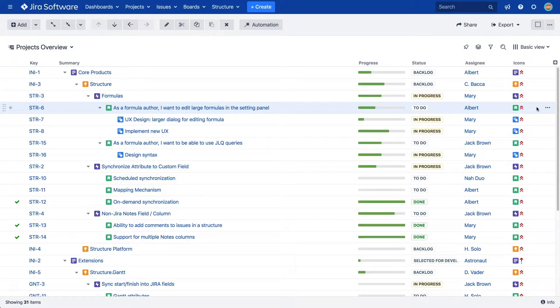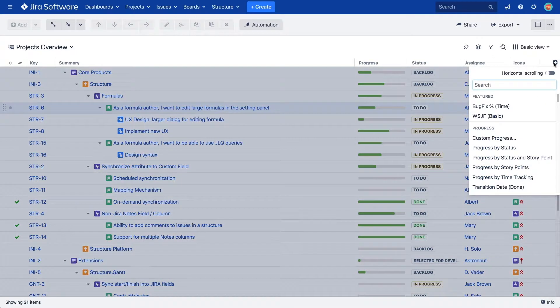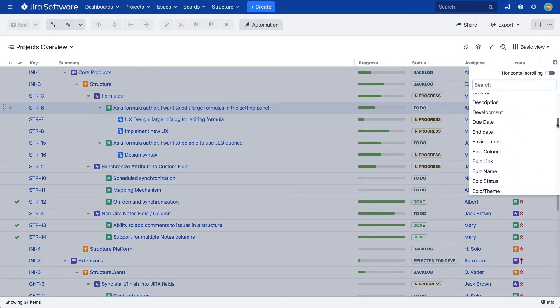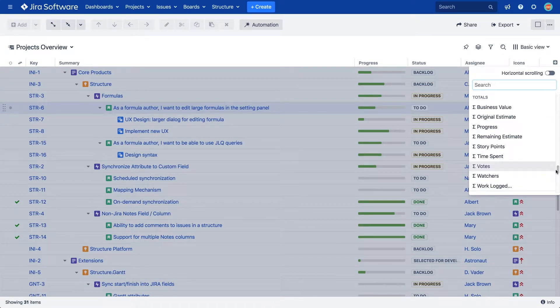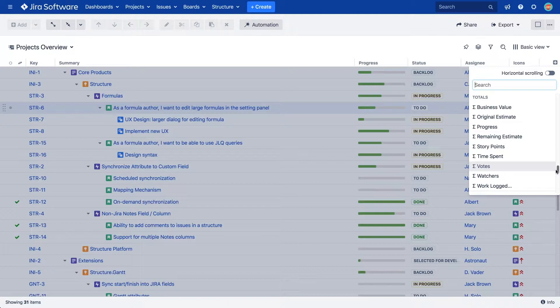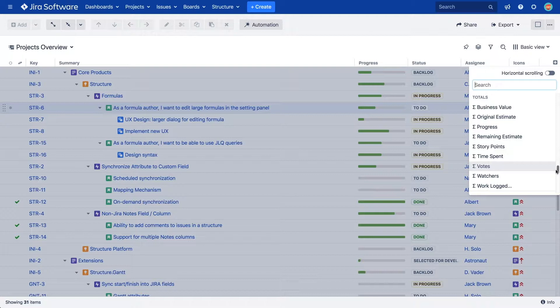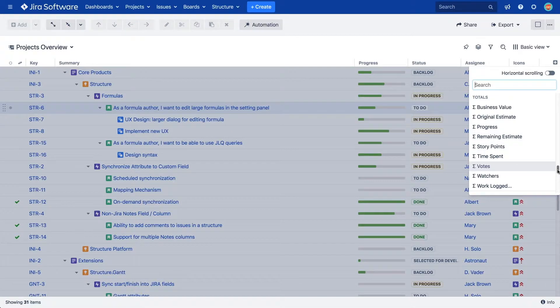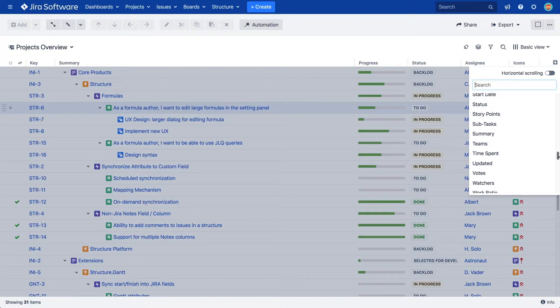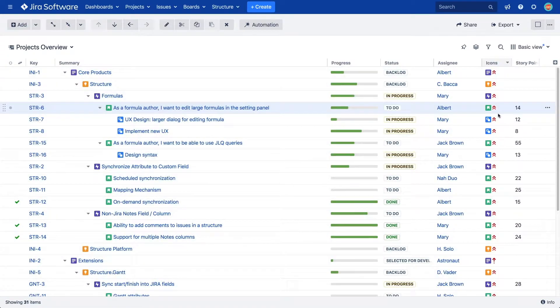Next, let's look at totals columns, which give you an aggregate value for any numeric field in JIRA. These are calculated as the sum of the current item's field value and those of its sub-issues. You can select from one of the predefined totals columns, or you can turn an existing numeric field column into a totals column. Let's take story points, for example.